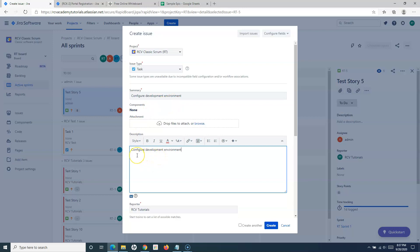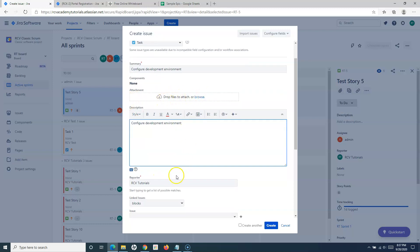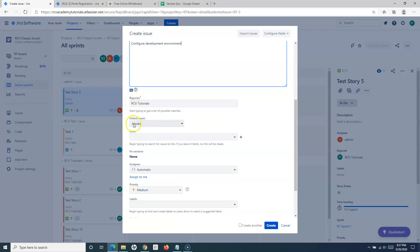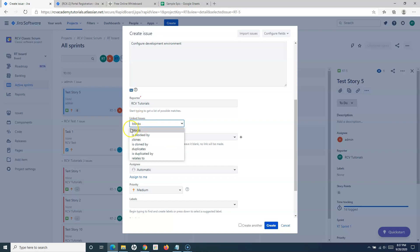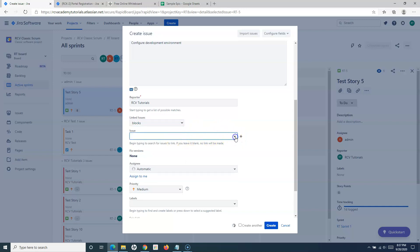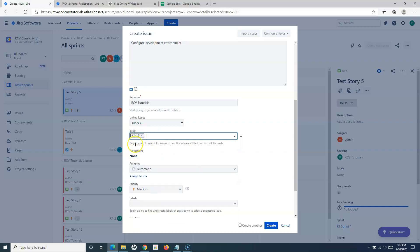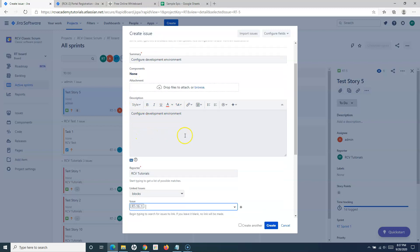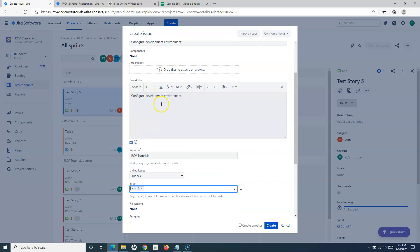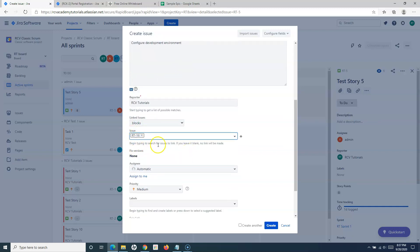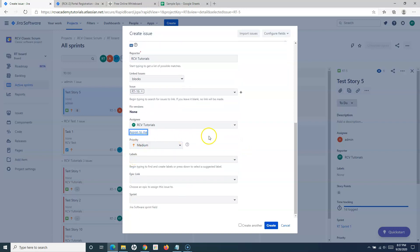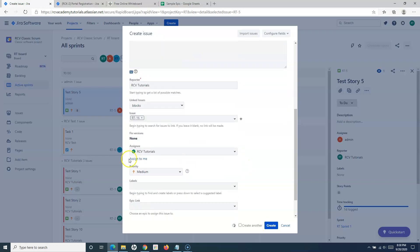In the Description, add what needs to be performed or the details to achieve that particular task. Attach any files if needed. The Reporter field works the same as it does for user stories. If this task is blocking any issues, you can select the linking options. For example, if this task needs to be completed before a developer can start working on a user story — such as needing the development environment configured before starting the 'Registration with Google Account' story — you can set that link and assign it to yourself or to whoever will configure the environment.